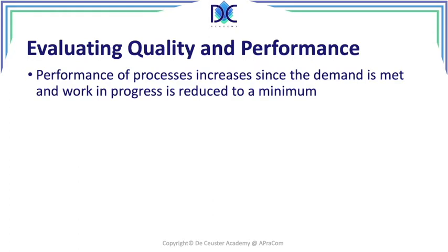They're not really finished. We call them work in progress. And then we have to put them together. That's in fact a very important issue that we have reduced with Scrum. That amount of work in progress is reduced, and we only have items that can be integrated in something that is working. And we immediately see the quality of it.